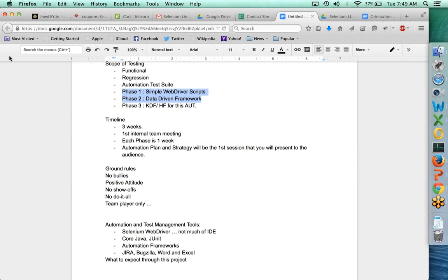Now, suddenly, one person has gone on a marriage vacation, or has put in the papers, or is on long-term disability leave. The communication does not go straight to the client saying, hey, this is what has happened. Sometimes they will think, out of the 80, don't worry, forget it. Why communicate and cause ripples? Let's keep executing. And the client suddenly may do an audit after a month or two and realize, where are the timesheets for this individual? Has the individual really worked?